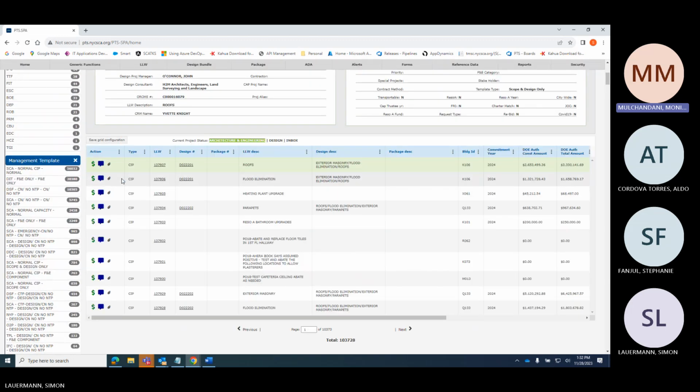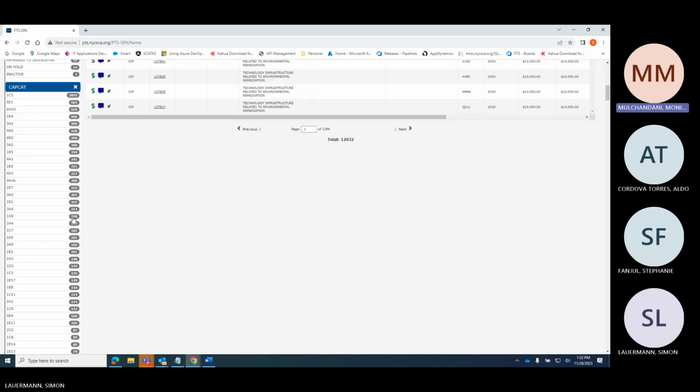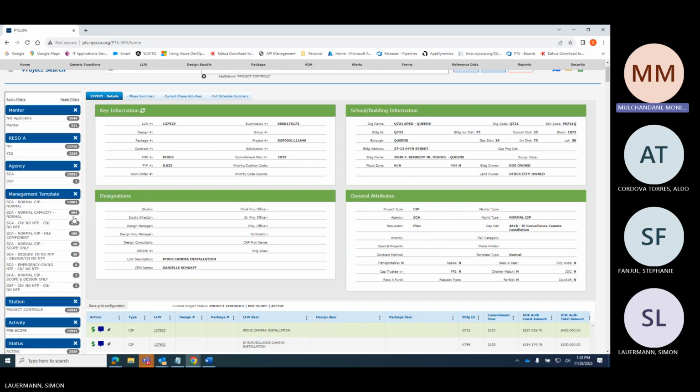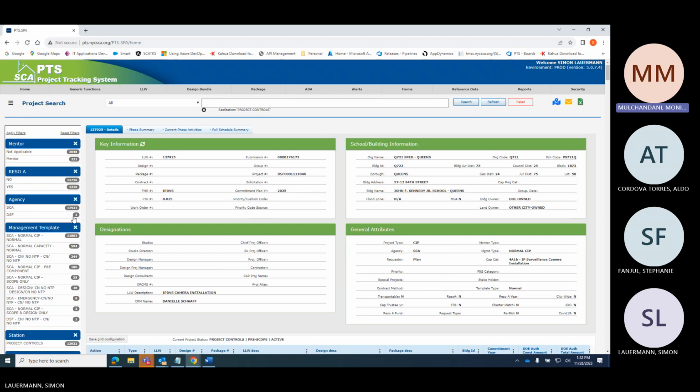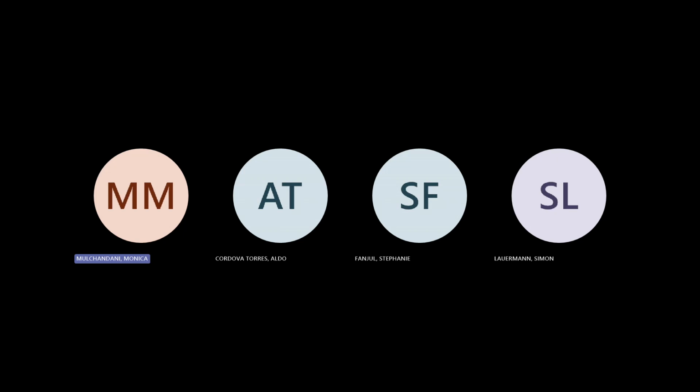So it's active, which makes sense, right? And once they're done with it, it will either be ready to forward or complete. It'll be ready to forward when it's in a chain where it has to go to the next department. That's when it's ready to forward, because there's an exchange from one department to another. If it is at the end of its life cycle, it might be complete, because it doesn't have anywhere else to go.